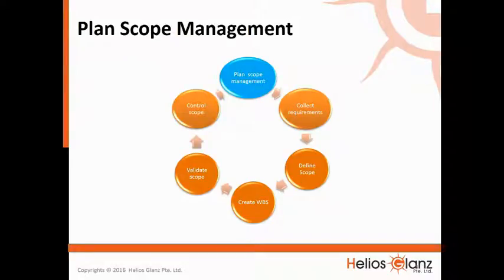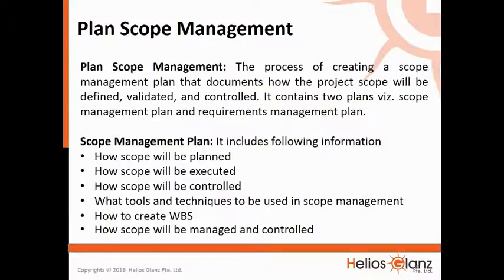Plan scope management. The process of creating a scope management plan that documents how the project scope will be defined, validated, and controlled. It contains two plans, namely Scope Management Plan and Requirements Management Plan.